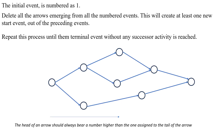Let's see an example of how to give numbers for events of the given network diagram. The initial event is numbered as 1, so here this is the initial event and I have to give it 1. Next, I have to delete the arrows for event 1. These are the new start events and I have to give the numbering in sequential manner from left to right, so next I give 2 and 3.